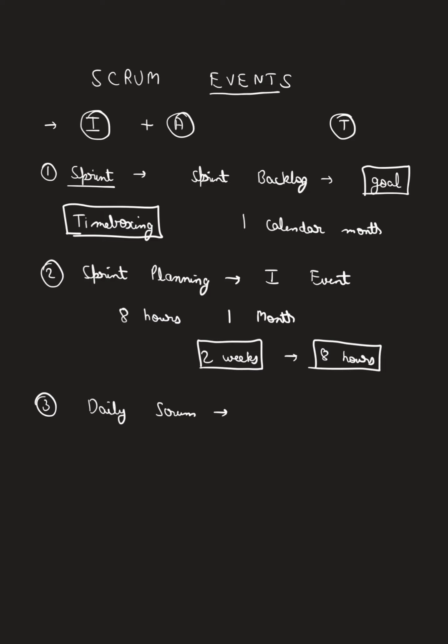Many companies are having daily stand-up meetings. Very, very similar to that, daily stand-ups or daily scrum. This is maximum 15 minutes. So time boxing is 15 minutes.